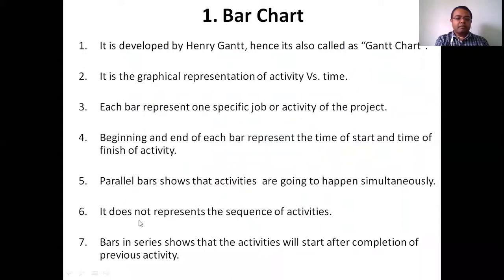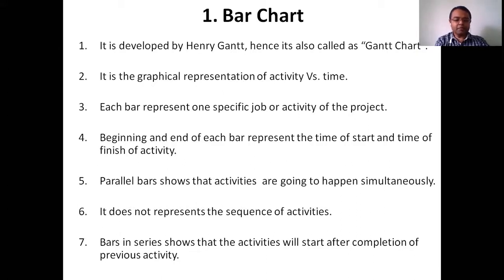The main disadvantage of using a bar chart is that it does not represent the sequence of the activities. This is a very important point.